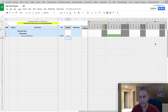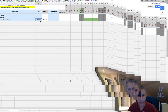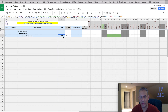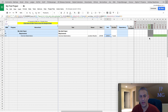Notice also that it fills in the entire week starting from Monday and going till Friday, even though the start date we entered — 2-10 — is on a Saturday. It's smart enough to understand that 2-10 being a Saturday is a non-working day. In a future video we're going to show you how to adjust the working days as well as holidays.